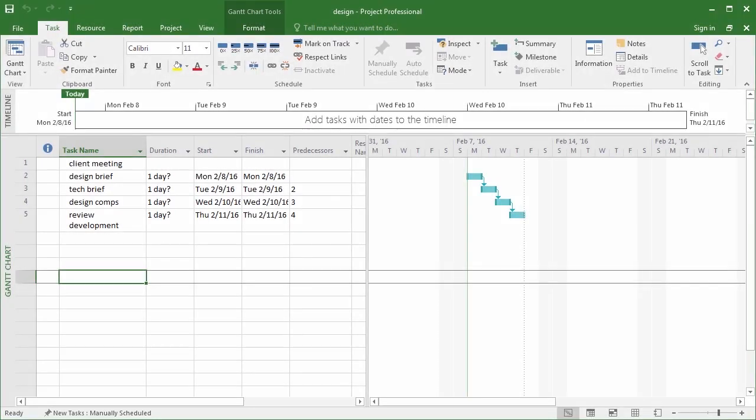Often a project manager will manage more than one project at the same time, and often the projects that he's managing will share resources. So it's nice that you can add resources to a project, but if you have to add those same resources to another project, it's quite possible that those resources will be over-allocated when you consider that they could be doing work on totally different projects at the same time. That's why most project managers utilize a resource pool.